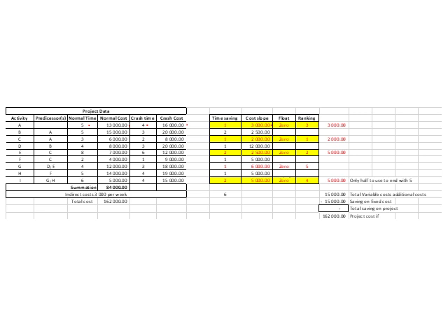Okay, and then we do that for the other items on our critical path. So we look at C and identify a 2,000 rand difference here. Then for our next item we've got 5,000 overall divided by 2, so it's 2,500. And then we've got our other item highlighted on the critical path, G.